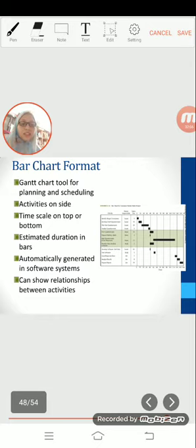You can probably see how it is an easy way to visually represent when activities are scheduled to occur during a project. A Gantt chart is a traditional bar chart that does not graphically display the dependent relationship of the activities. Okay, you need to be sure to create the network diagram and connect the bars in the Gantt chart with arrows to show the relationship. The project management software can automatically generate a time scale bar chart from a schedule table that is based on the network diagram.